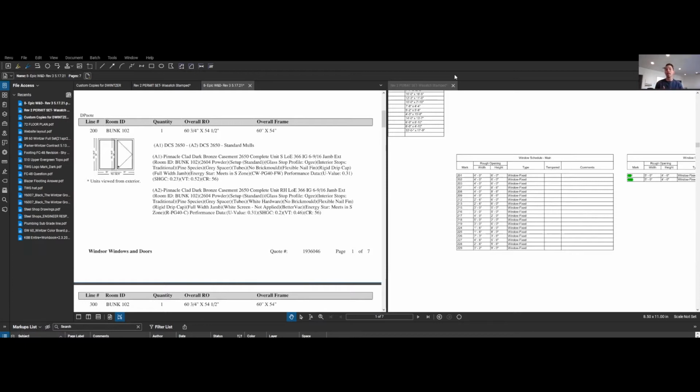However, he called me on Friday and said, I have bad news. The window lead times are now at 12 weeks. So now we're pushing a little bit further out when they're going to be coming, just almost in the nick of time when we need them. So today is Monday and we're ordering the windows today, and we're going to beat that 4% price increase as well.